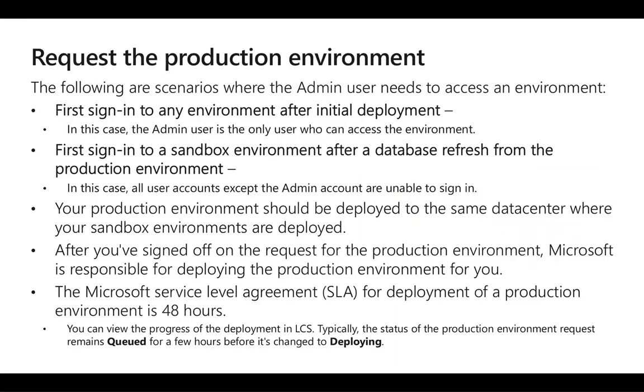After we have completed the analysis, design, development, and test phases in the Lifecycle Services methodology, and the go-live assessment has concluded that the project is ready, we then can request our production environment. Microsoft recommends that we select a service account, for example, a generic user account, as the admin user of the environment that we deploy. If we use a named user account, we might not be able to access the environment if that user isn't available.